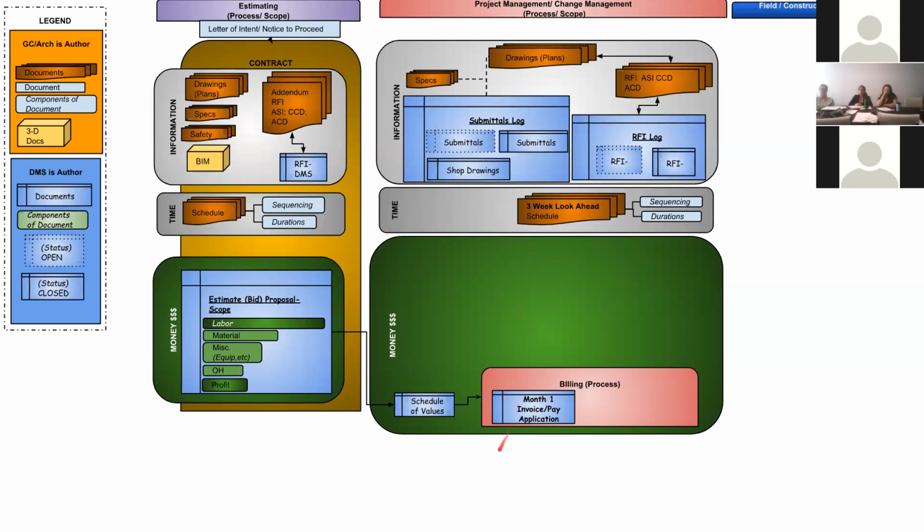the master schedule, there's an opportunity for us to say, look, we're not responsible for the delay, and two, that now that there is a delay, we built our entire manpower plan or labor force plan and material plan based upon your original schedule. Example would be, we were going to be building in March, April, May, per the original master schedule, contract schedule. But now the project has slid back and we're not building until August and September.